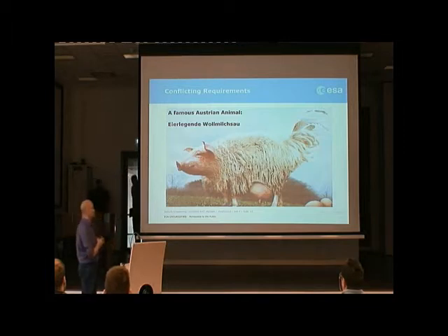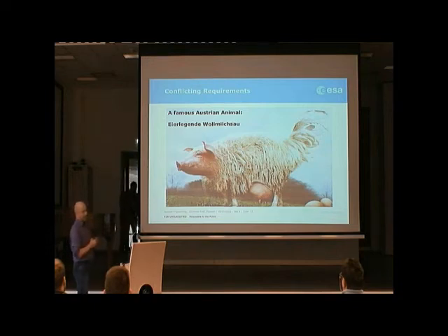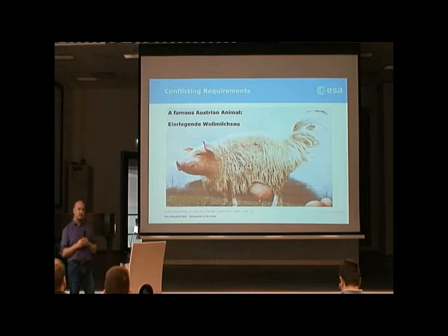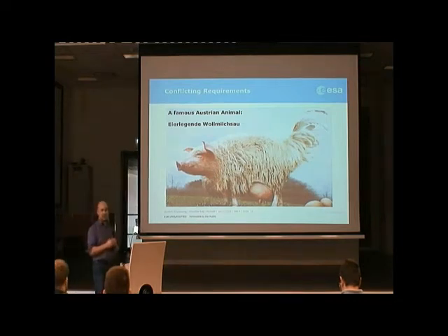So if you have contradiction in your requirements, you should go back to your science objectives to see what you really need to do, and maybe to use some de-scoping. That means leaving out some objectives to identify what is the most important there.